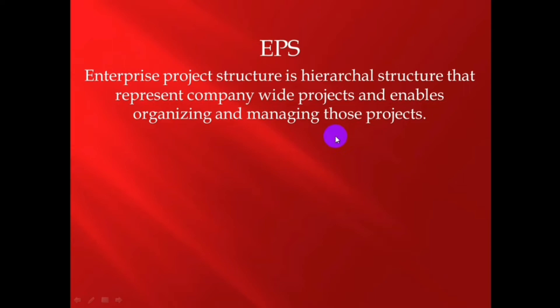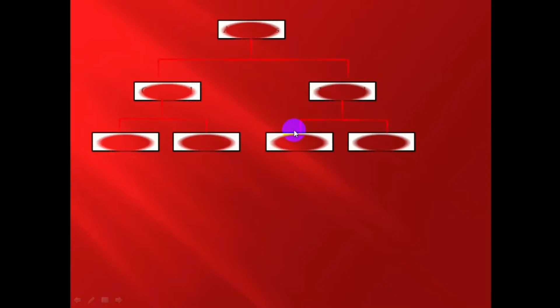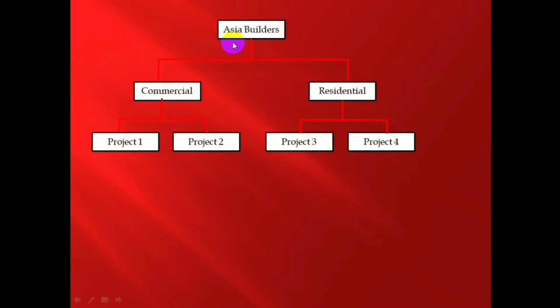Enterprise Project Structure is a hierarchical structure that represents company-wide projects and enables organizing and managing those projects. EPS shows the structure of projects in an organization. To take an example of EPS, let's look at this tree.